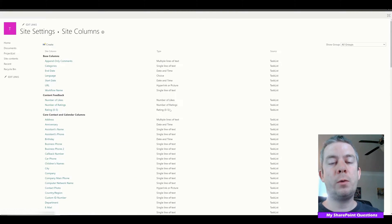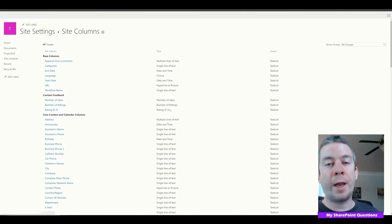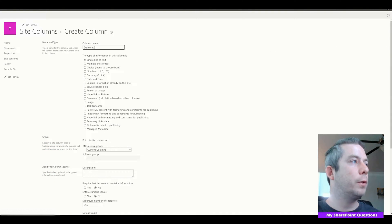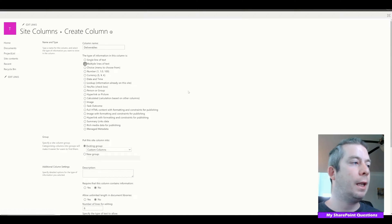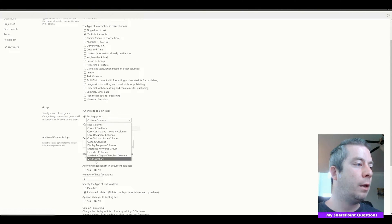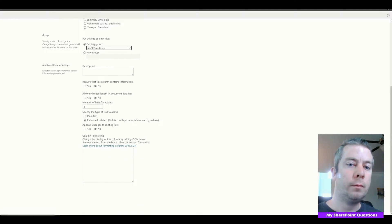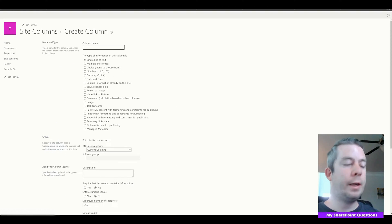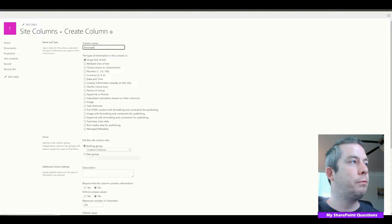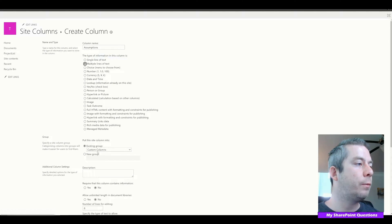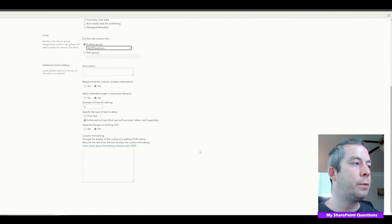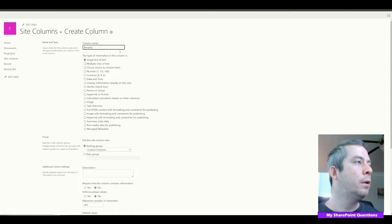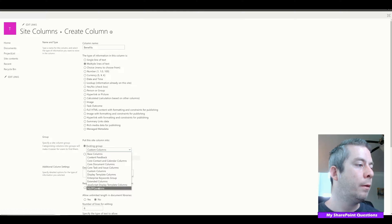Now let's create a column that's only in our regular projects and not in our software projects. This will be Deliverables, and we'll leave it as multi-line text, in my SharePoint Questions group. Then I'll create a few more quickly: Assumptions and Benefits — just to see the difference between the two project types.